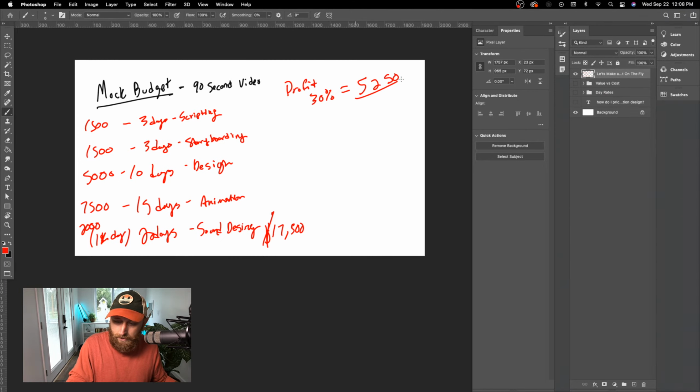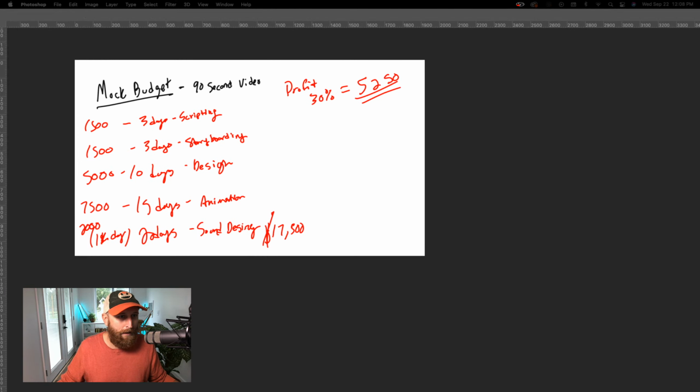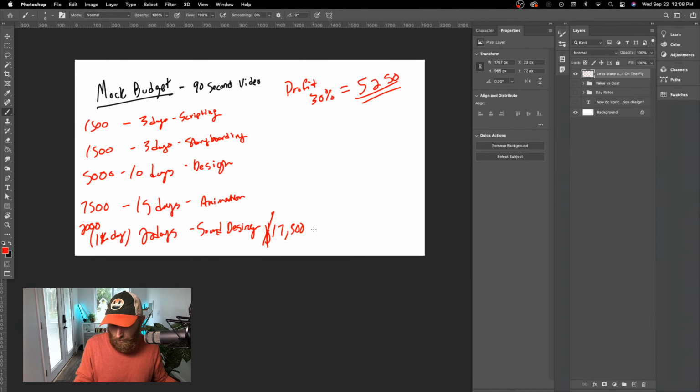So this is going to be my profit for selling the work. And then I need to add that back in to my 17,500 for the project, which takes me to, so plus profit, $22,750 to do this 90-second video.